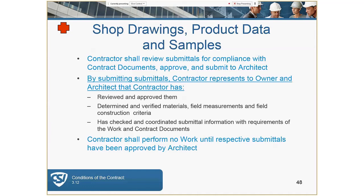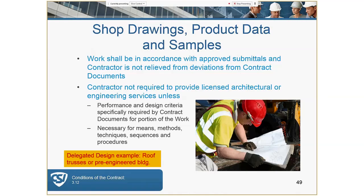The contractor shall review submittals for compliance with the contract documents, approve them, and then submit them to the architect. By submitting, the contractor represents that he or she has reviewed and approved them, determined and verified the contents, and checked and coordinated those submittals with the requirements of the work and contract documents. The contractor shall perform no work until those submittals have been approved by the architect. Work should be performed in accordance with the submittals — however, submittals do not overrule the construction documents.